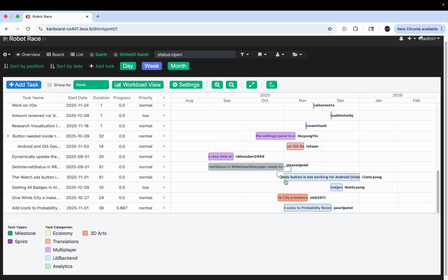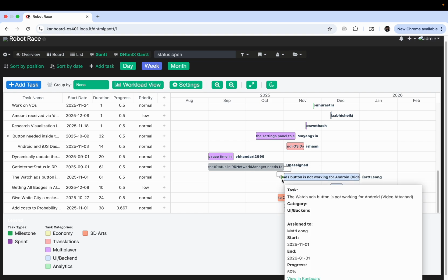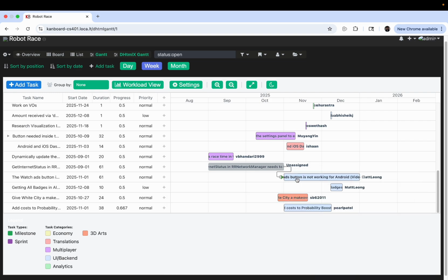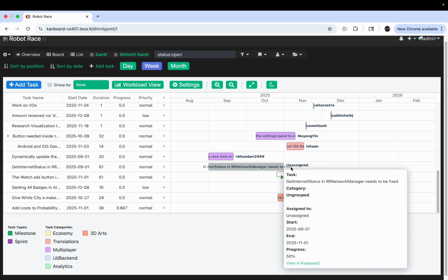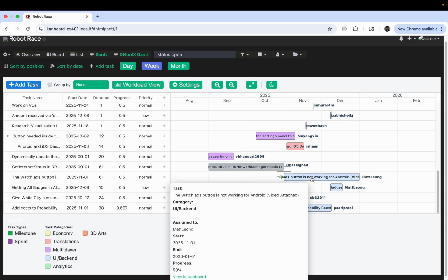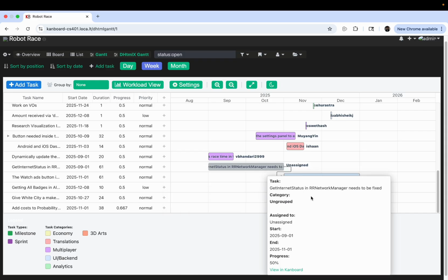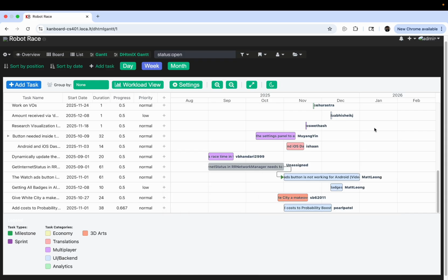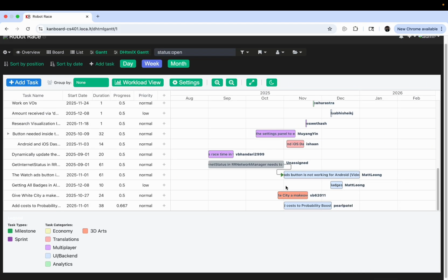And by linking those two tasks, you actually created an internal link within Kanboard, which means "blocks" or "is blocked by". So connecting this means the gray task blocks the blue task, and the blue task is blocked by the gray task. It's the same if you want to do it outside of the Gantt chart, and create the link using the Kanboard features instead. It will work the same.